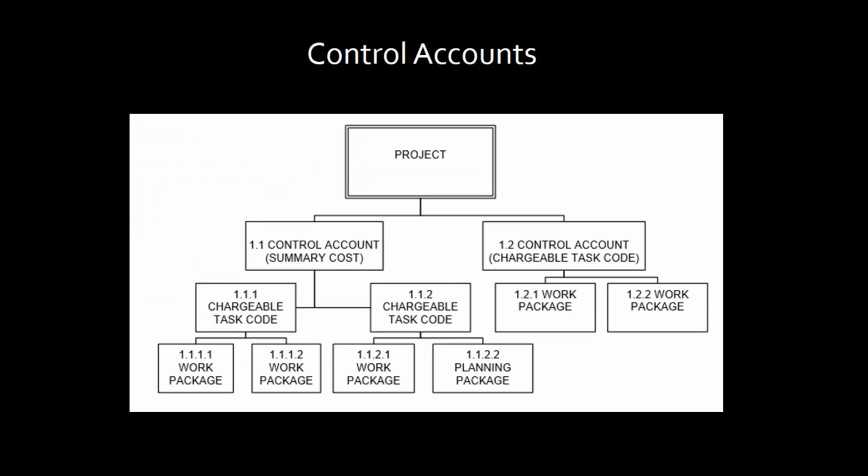And remember control accounts. This will be on the exam too. Peppered through our work breakdown structure could be control accounts. Here we're using these for different uses. We may be doing these just to do summary totals for a particular section of a project. We may use a control account that actually kicks off an accounting process to pay a vendor. There are several reasons why we might want to do this, but the best answer I can give you is it allows us to do some micromanagement on our project.